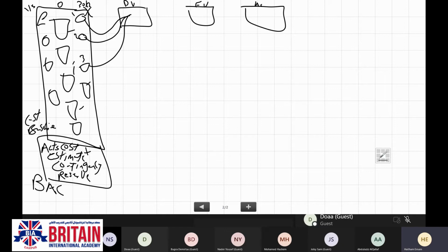And each one of these activities has a certain cost estimate. So the planned value will be representing the 1, 2, and 3, and it is the cost estimate for the planned work. You are planning to finish these 3 activities by, let's say, the mid of June, for example.